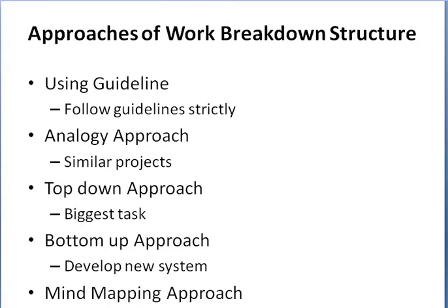So these proposals must include cost estimations for each task in the work breakdown structure. As we have seen, the whole breakdown structure constitutes different tasks. So the cost estimation required for each task is to be mentioned in the guidelines at a detailed as well as summarized level.